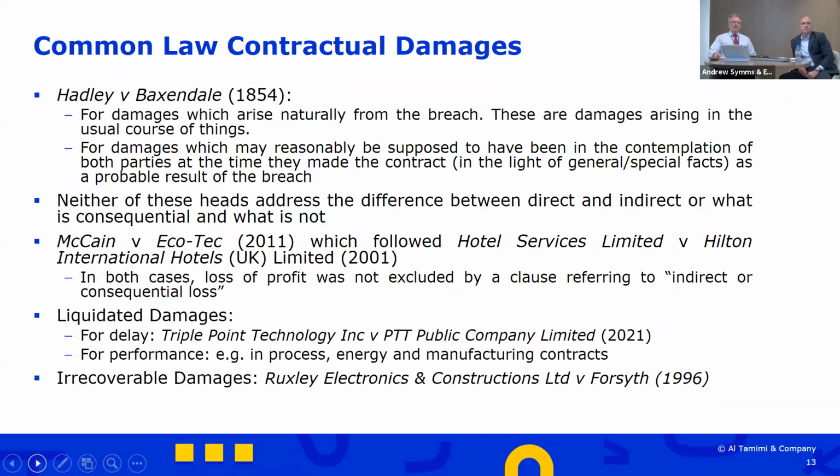I make no apology for doing a quick run through the contractual law as it is applied in the common law jurisdictions, particularly in England. You can see that there is a great case there, and if you ever want to remember a case and you're in construction law, remember Hadley and Baxendale. It's from a very, very long time ago, but it's still good law, and it establishes the nature of the damages, and there are these two limbs.